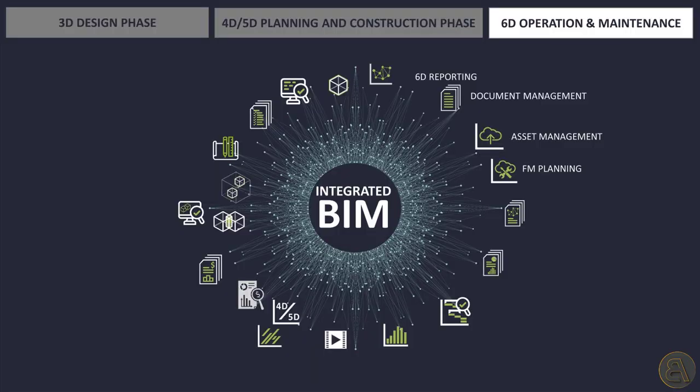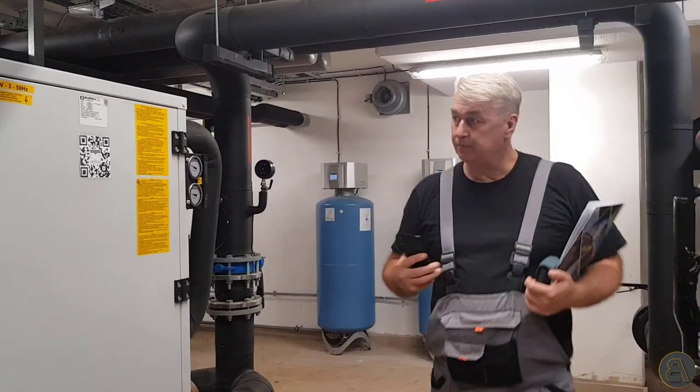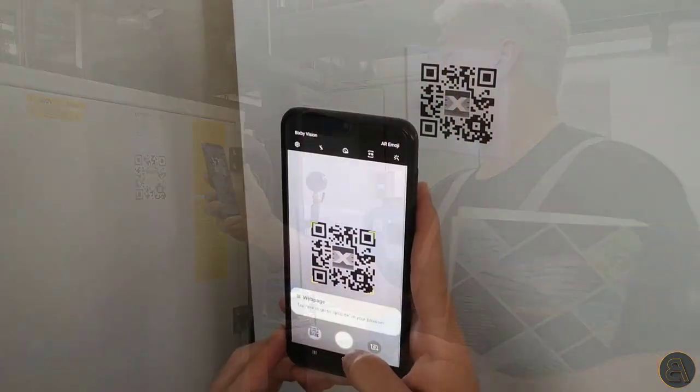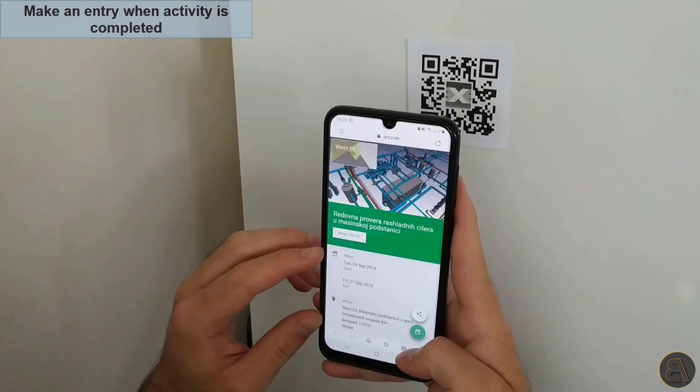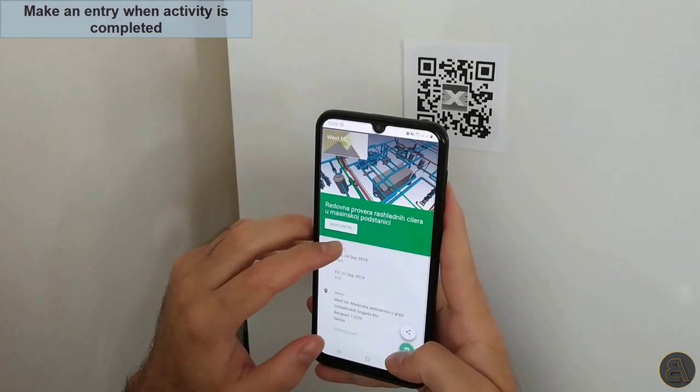The last phase is operation and maintenance. Facility maintenance is dependent on the information database established in the previous phases. We can use the BIM model and data layers within it for facility maintenance planning, asset management, attaching relevant documents for document management, as well as 6D reporting.